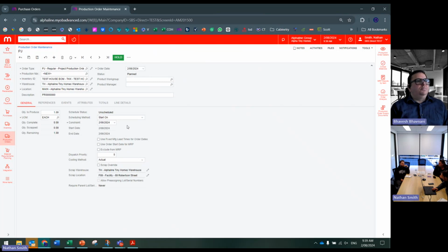The process for windows is longer than steel by a mile, for some of them. So we can start the project in the first bay, but then when it gets to the second zone, we've got material that's required with a 6-week lead time, which is longer than the lead time for the first work center. So that means you cannot start work for at least the next 4 weeks then. Yeah, 4 to 5 weeks. So the lead time is not going to work.